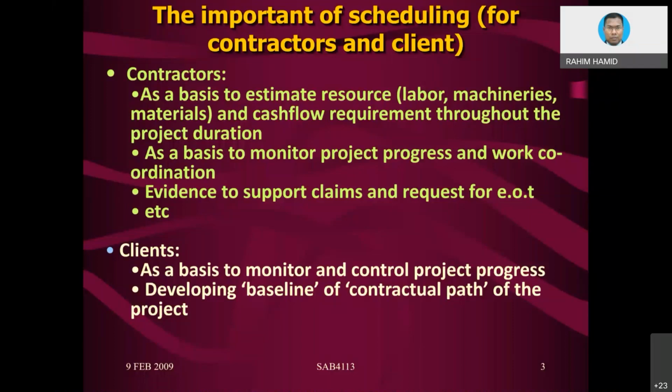So that is in the contract. Sometimes the client or the client representative likes to play fool with you. For instance, they say, hey, you didn't give us notification of delay, whereas they already know about the delay themselves, but they follow the black and white of what is written there. You see, so you must really know your contract. That's what I mentioned in the earlier slide.